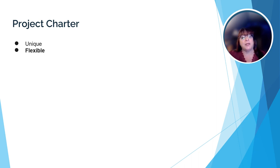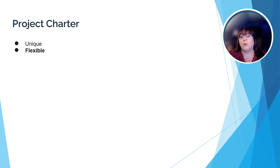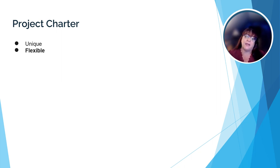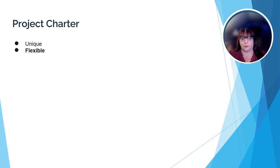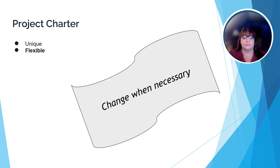Remember, the project team initially created the project charter based on what they think they know about the project — what tasks it will entail, what kind of schedule it will likely need, how much money it's going to cost. However, once they start actually working on the project, adding more detail and finding more information, the charter will change. The project charter should be kept up to date so the project manager and project team can keep track of scope creep, meaning the project going way off from its initial intent. So the project charter must change when necessary.